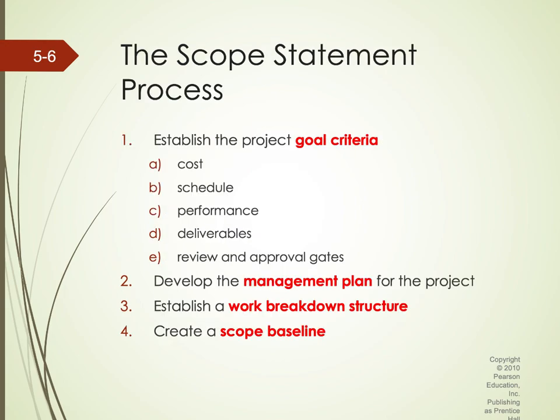Scope statement, goal criteria: you need to establish a few things. Cost, for example. Even as simple as creating a simple website, there must be cost, for example the domain name, the server, what the template is going to cost. Today you can buy a template from the internet, for example WordPress. If you want to use WordPress, how much is it going to cost, what are the monthly maintenance fees, and also not forgetting your man hours. Schedule, the timeline; performance, how good it is; deliverables,